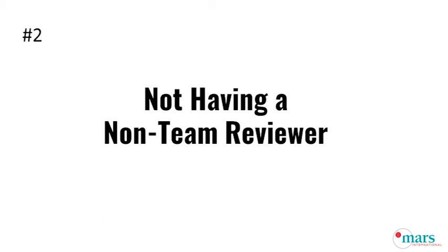The things that you forgot to say, that you forgot to put into the spec, those are the ones that are going to be more challenging for you to find, particularly as somebody who mentally understands what the project is, so you fill in those blanks yourself. Having somebody outside the project go through the spec and read it is going to be your best defense for finding those types of things.